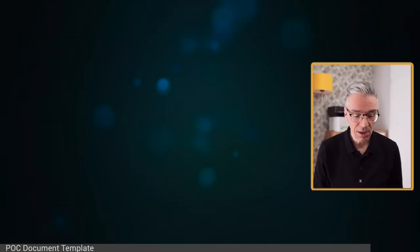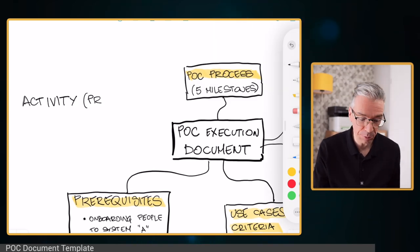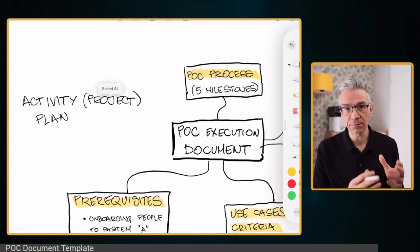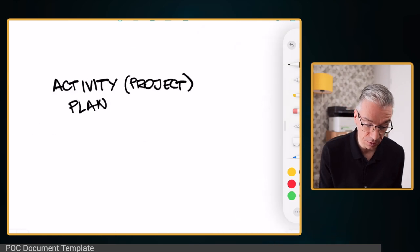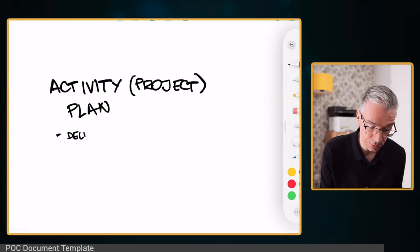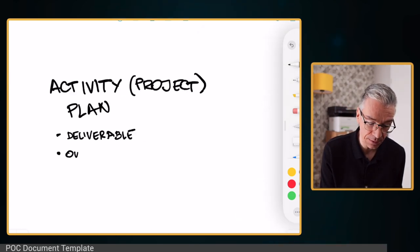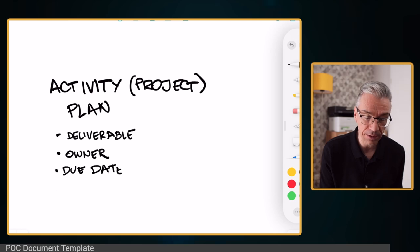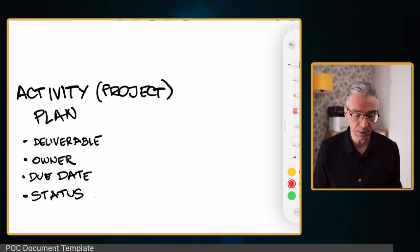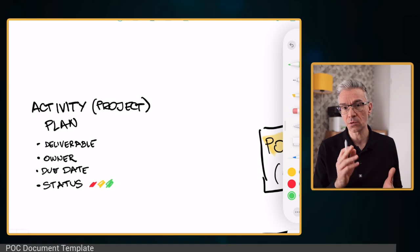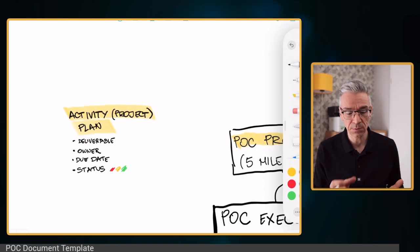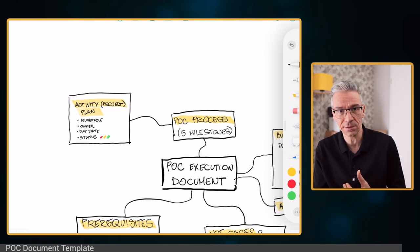The last thing I want to have in this document is the actual project plan — the activity plan. This thing drives the POC execution. It's important to have the deliverable specified, the owner specified, the due date, and I like to have a status column. In this status column I track the execution progress. We have those check-ins and stand-up meetings where team members on the customer side report on progress, and that's what I like to track.